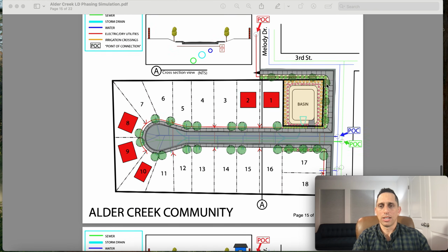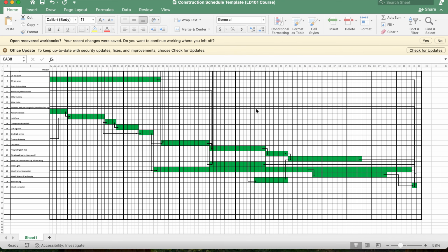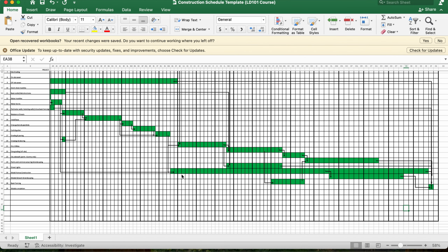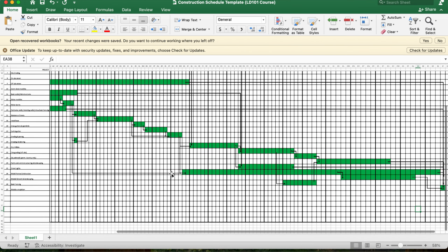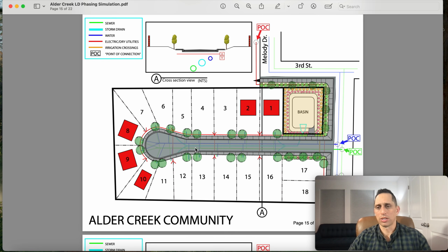And then as we start getting to that, simultaneously, they can also start building the houses, which could even start a little sooner. Really, the only thing that's hinged upon the model home starting is the paving. But again, by the planning, we can start seeing that, as we showed earlier here. We can start seeing when the model's construction can start, and we have that linked to when the paving is done. But while the model home construction is going, like I said, we can be efficient.